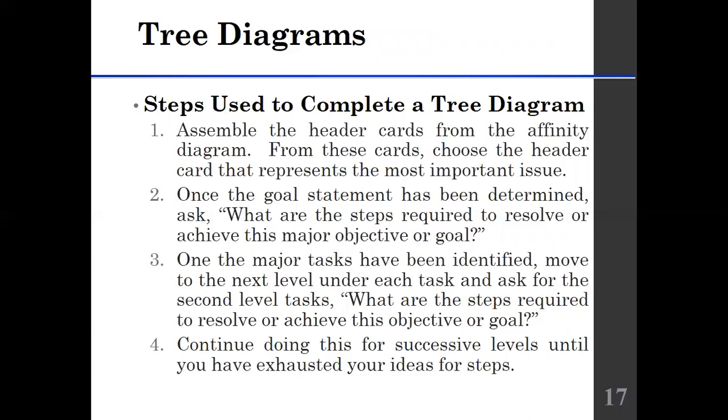The first one is to assemble the header cards from the affinity diagram. From these cards, choose the header card that represents the most important issue. Once the goal statement has been determined, ask, what are the steps required to resolve or achieve this major objective or goal?